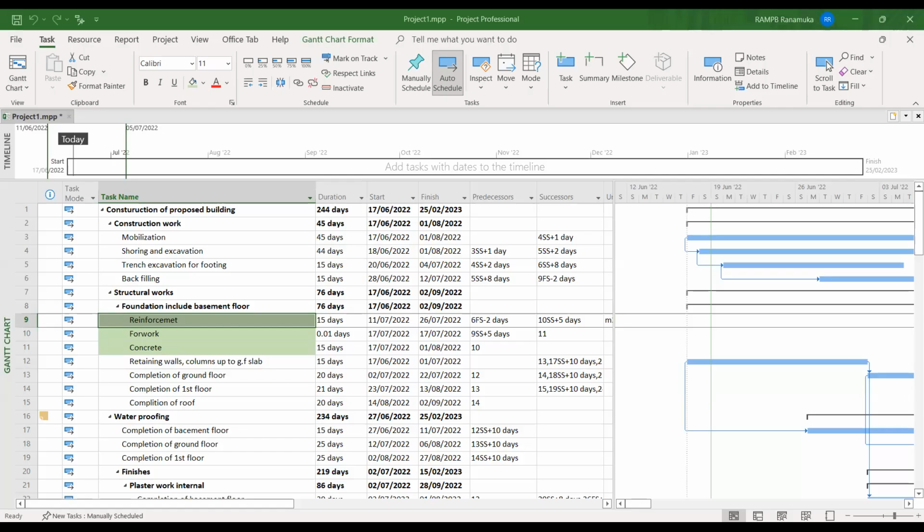So in here we gave 11 cement bags for 1 meter cube. So what will happen for 154 meter cube? So that is here. You can check this one. That means 11 with this, so I just put it with my own number. You can check, and you can correct the figure.